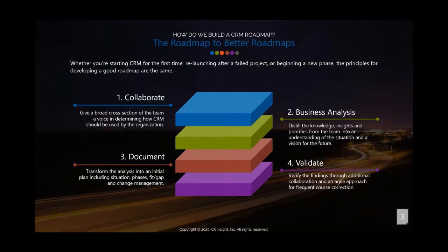Then 3, document it, put it all together, assemble the plan so that it's ready to go, and then 4, validate it. Go back to that group and say, here's what I heard you say, here's the approach we're taking, here's why. Be open to, it might not be done yet, so go back and do some rewriting of the plan. This looks like, oh my gosh, this might be super time consuming. If you're big, it might.